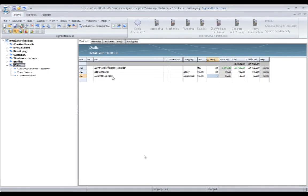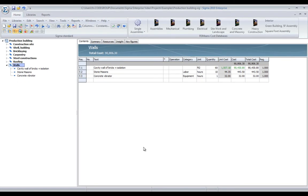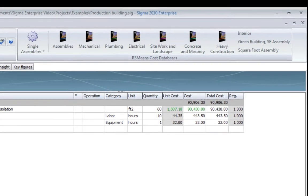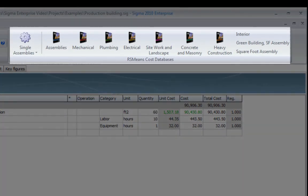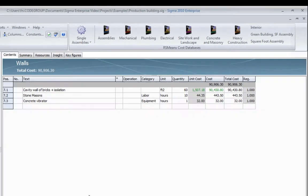Besides creating your own libraries, you also have the option to buy RS Means cost databases, which are very well integrated with Sigma. You will find them in the top ribbon if you have access to those. Please go to sigmaestimates.com to find more information on how to buy and install those databases.